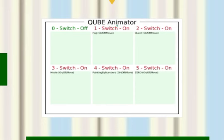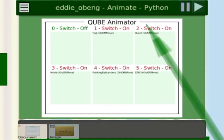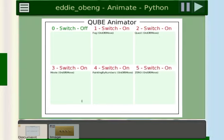There's one for foggy projects: don't know what to do, don't know how. Quest projects: know what to do but not how. Movie projects: method decided, don't know what the goal is. And paint by numbers: we know exactly what we're doing and how to do it, it's just complex.